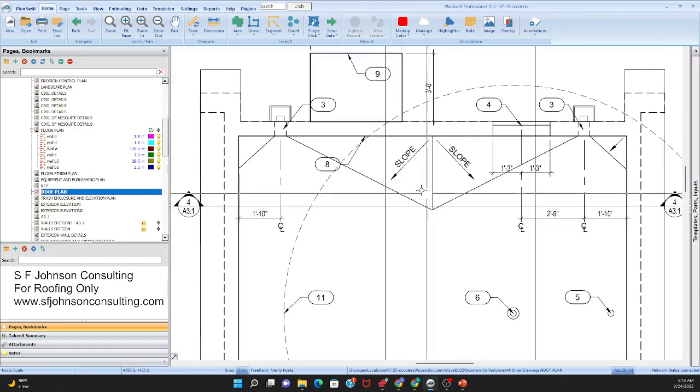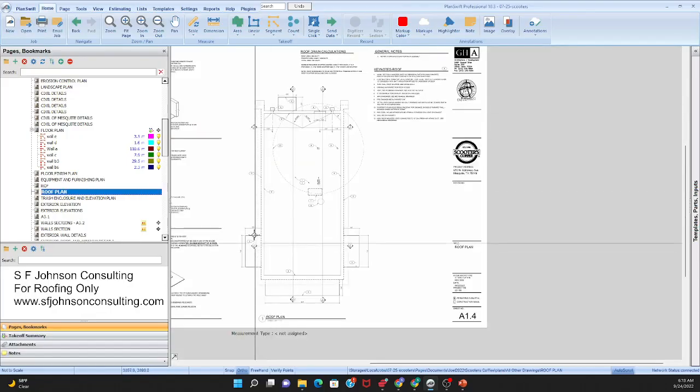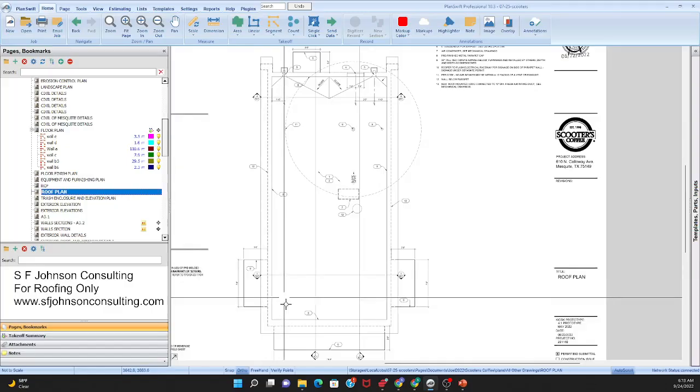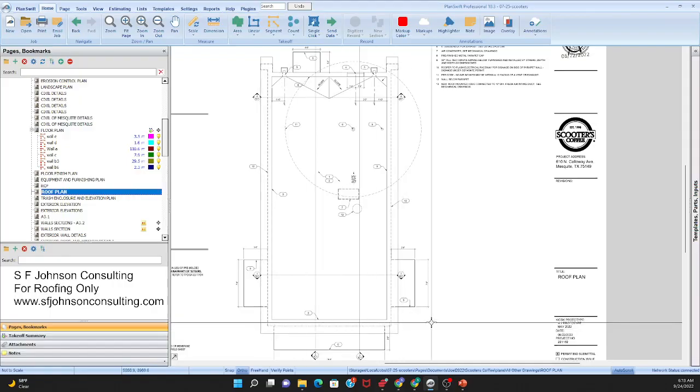Okay, and so what do we do as the roofer? Square feet of the flat roof. Now we know we have to break up the section view, right? Because at some points this parapet wall is 3 feet, some points it's 5 feet. So we have to do 5 feet times however many linear feet. So we're accurately determining the additional TPO for the parapet wall, right?